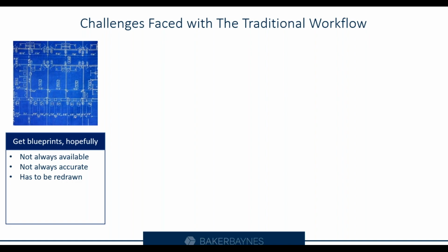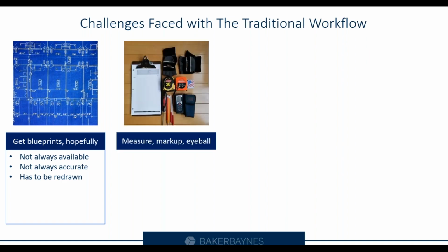By this, I mean blueprints may not always provide you with sufficient details for the entire construction process. And this can result in ambiguity, uncertainty, and lead to confusion. This can cause major change orders and basically increase the overall project cost.